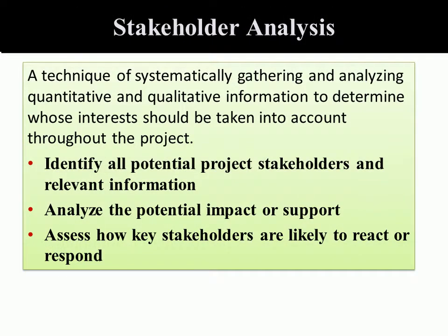So one of the techniques used under identify stakeholders is stakeholder analysis. It's a technique of gathering and analyzing both quantitative and qualitative information pertaining to your stakeholders. You want to analyze the impact or support of them. You want to assess how these stakeholders are likely to react or respond to changes within your project. And there are 4 grids under stakeholder analysis techniques that you can use, the most popular being the power interest grid.